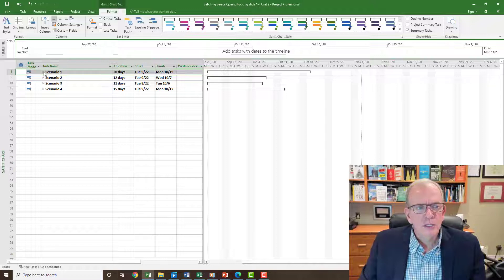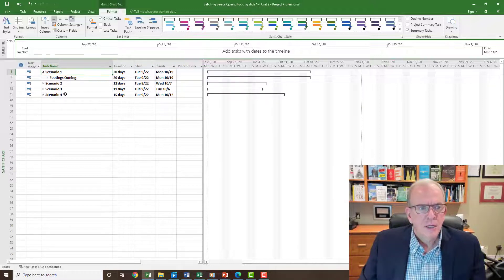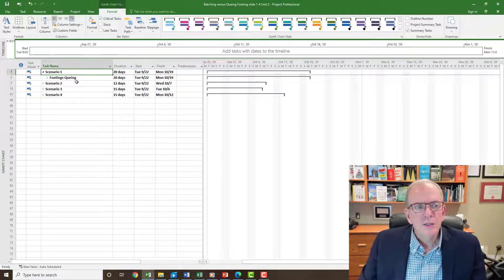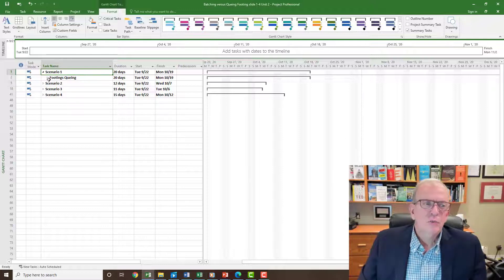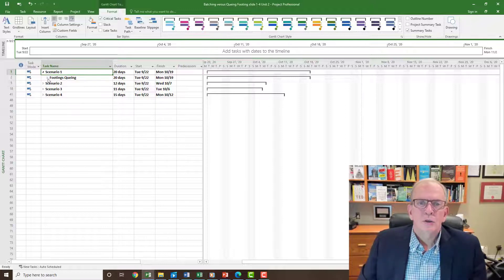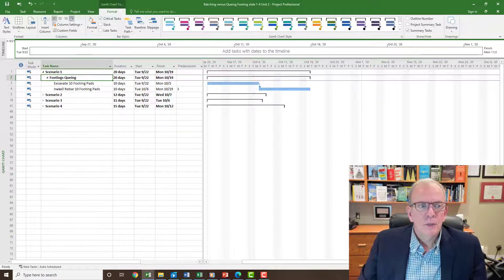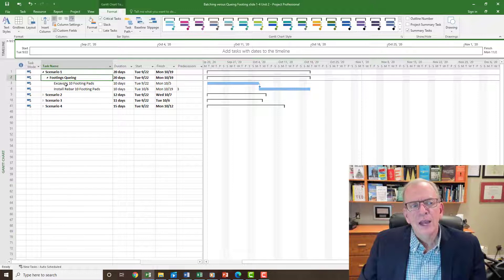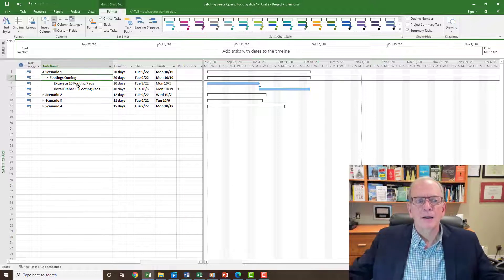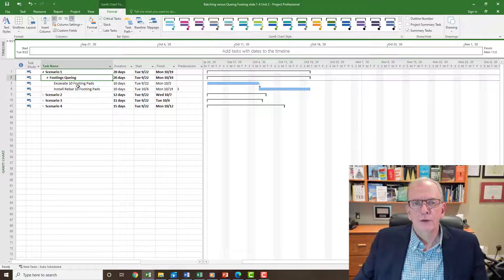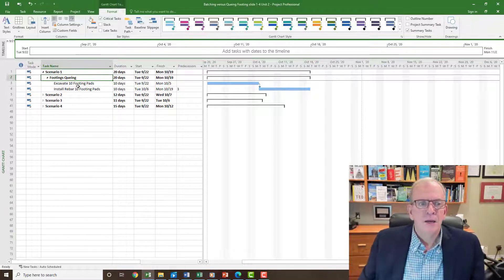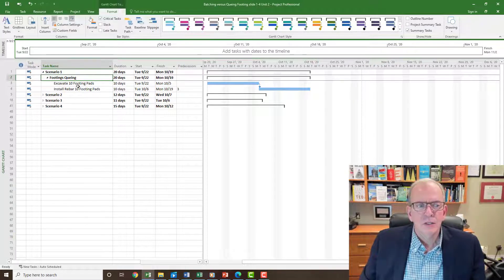So scenario one, it's a pretty simple scenario I'm running with this. I've got footings queuing, and I'm calling it footings queuing because this one's really about doing big batches and wait time. So if I open this up, let's say that we have to excavate 10 footing pads and they're very large footing pads and we figure they're going to take 10 days to do that.